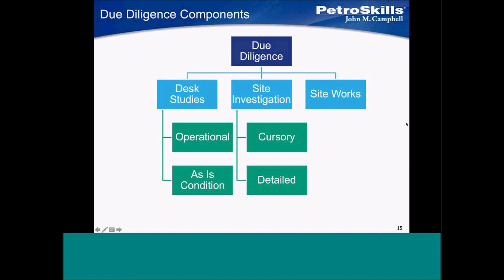Something I want to talk about is that desktop studies — I've broken it up into a couple of categories: operational, which is typically operational conditions, and then as-is condition — in other words, what does that plant look like if you were to go out there? Then site investigation basically confirms — you're trying to validate everything that you found in the desktop studies. We've got two sub-categories: cursory and detailed. And the last one is site works.